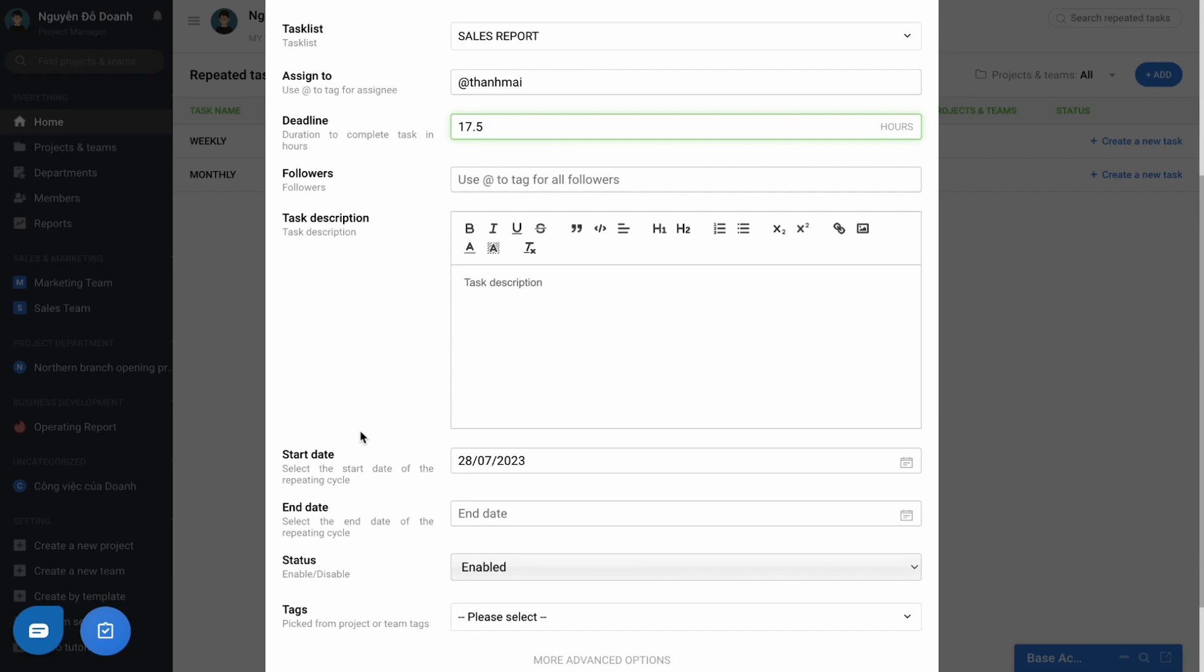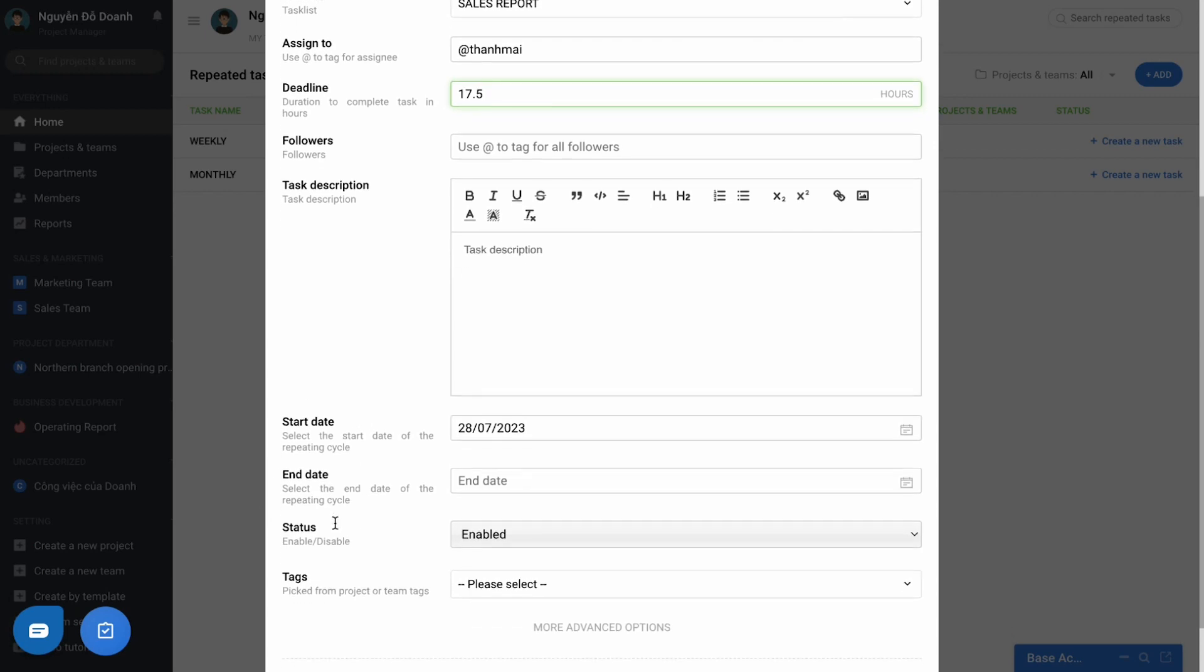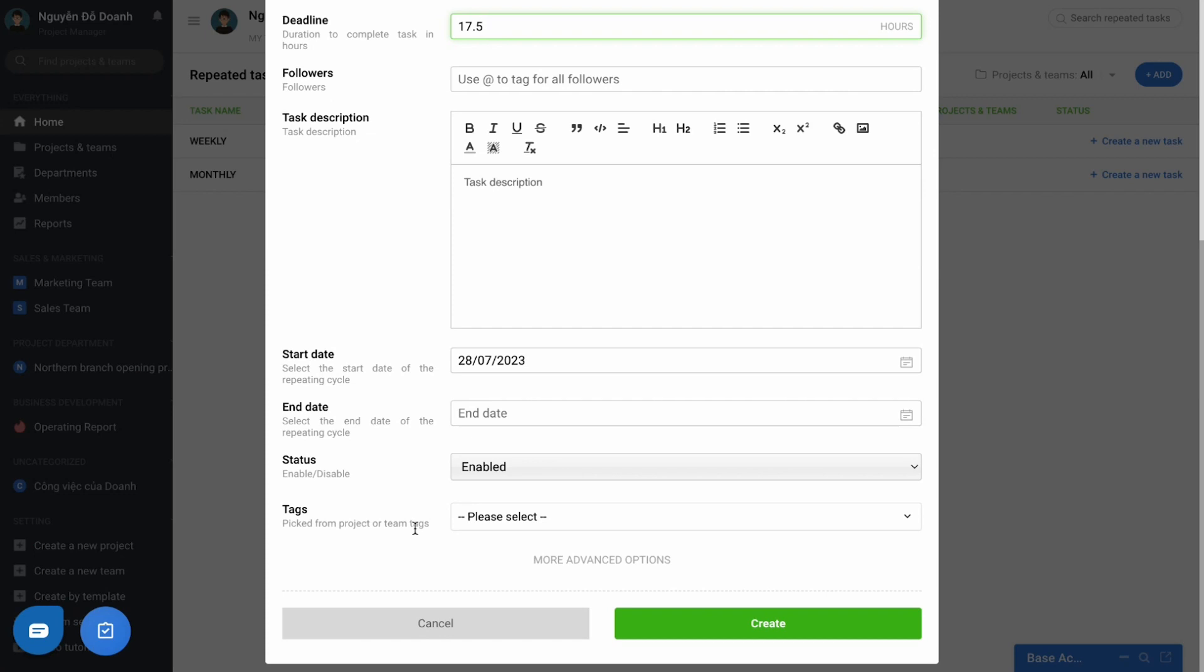The starting or ending date of this repetition. If there is no end, the work is created forever unless the user proactively disables. And finally, press create button.